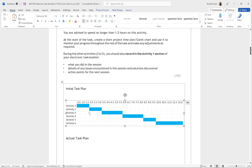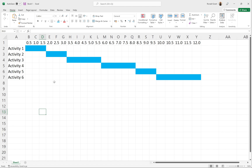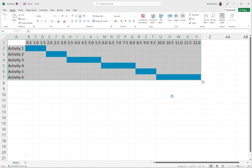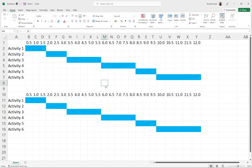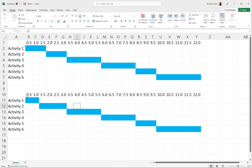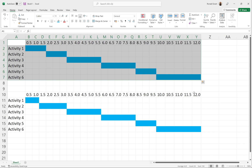When we do the second Gantt chart, we name it 'Actual Task Plan.' I'll add that label now. You can copy the first chart, paste it below, and adjust timings to reflect what actually happened — for example, if activity one only took one hour, you'd highlight only two cells instead of three, and leave the rest unfilled. Activity two might have taken two hours instead of 1.5, so you'd highlight four cells. That's how the actual plan differs from the initial one.